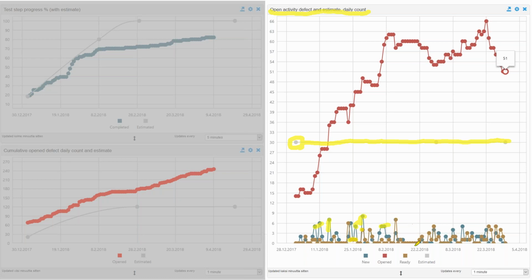As you can see, that happens all the time. They are fixing and testing, but the speed is not enough. The ability to solve those issues is too low. When I'm the project manager or test manager, I'm always watching this graph every day, because you must be sure from day one that your solving ability is at the right level.